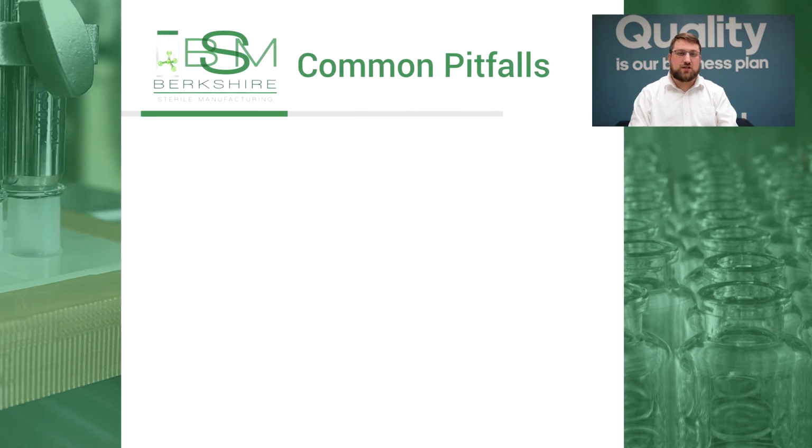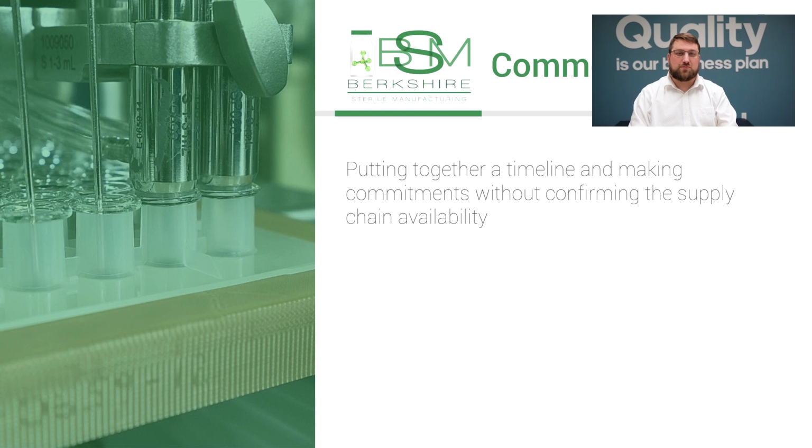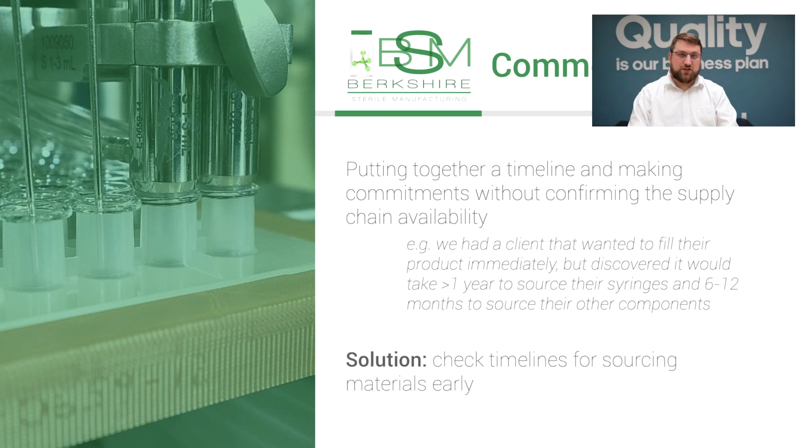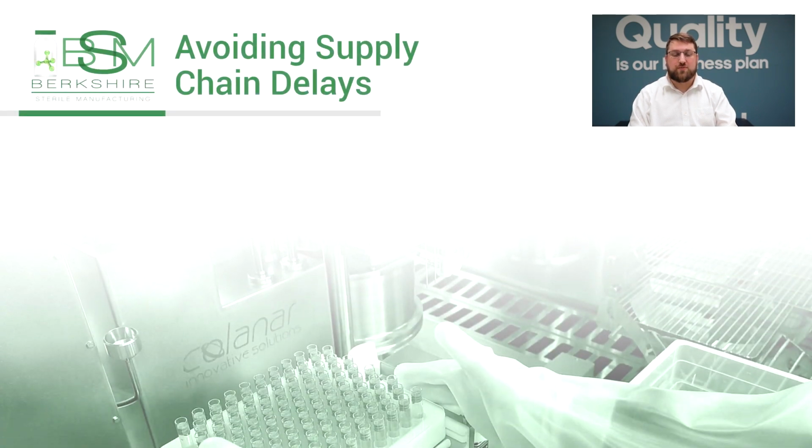And I have also seen clients put together a timeline and make commitments without confirming the supply chain availability. For example, we had a client that was eager to fill immediately. They had a specific syringe already picked out, and when we checked the lead times to get those syringes for them and get the fill on our schedule, we discovered that it would take over a year to source a syringe. Other components were also at 6 to 12 months. Supply chain issues have been significant and common recently.